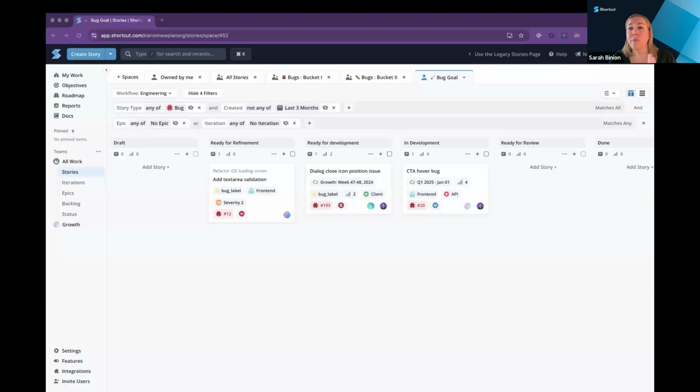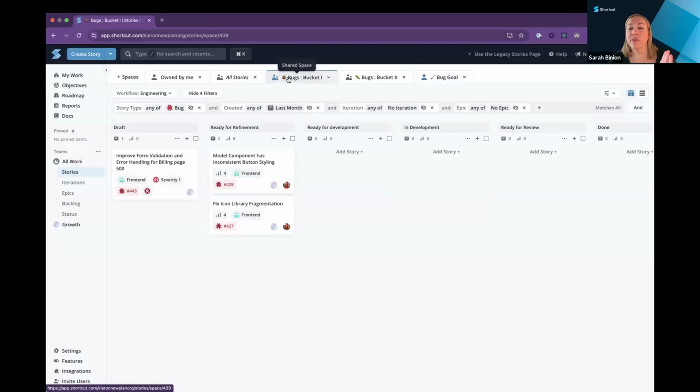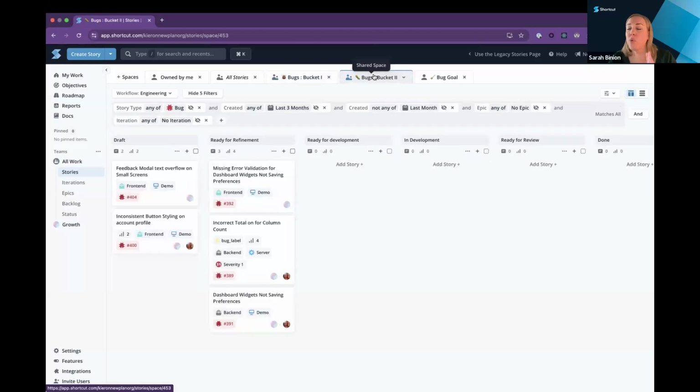And I can maintain this framework of accountability, I have this, you know, 4 week iteration check or 4 week check-in and then also a quarter check-in. And that helps make sure that we're not losing bugs within our system, because sometimes a couple days pass and it's out of sight, out of mind. So having this accountability check-in to make sure things are categorized helps us make sure that we're grouping things and keeping aware of what's in the system.